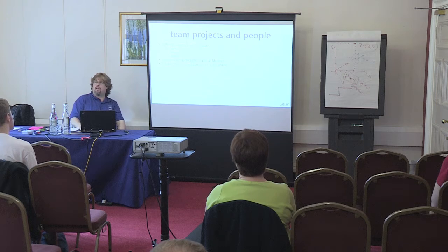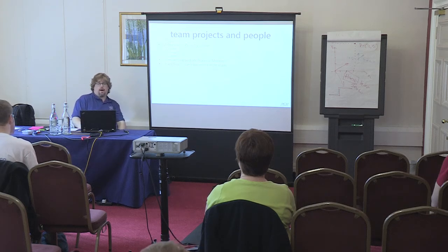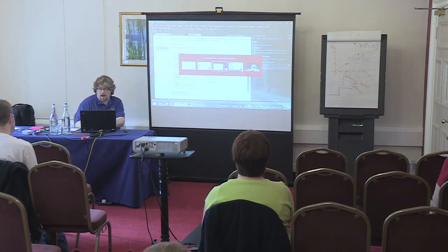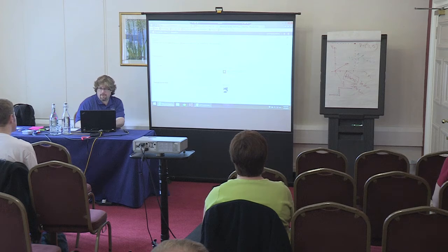As well as it's useful when you have teams that work on different stuff and have different schedules, but there's shared code, there's a lot of stuff that goes together, but we want some separation. So it gives you the benefits of a team project without the overhead of multiple team projects, and yet you can have individual backlogs, you can have individual schedules, but you're on the same process. You're still doing Scrum, you're still doing Agile. You get a default one, which is whatever your team project name is. So when I created this project earlier, I have a team that is implicitly known as the DW DSO 2014 team.